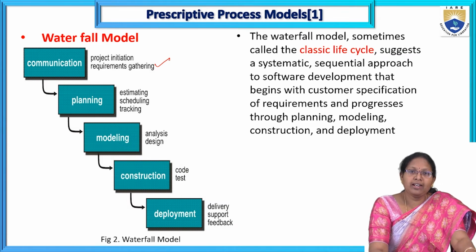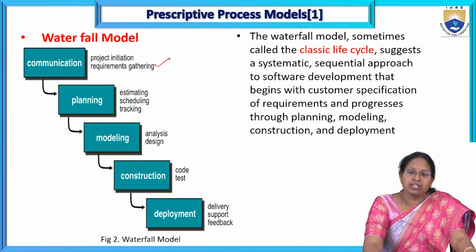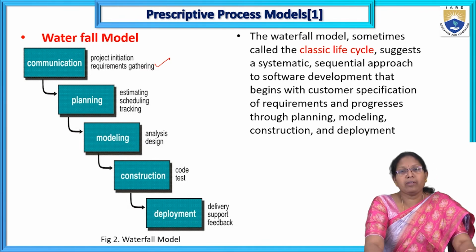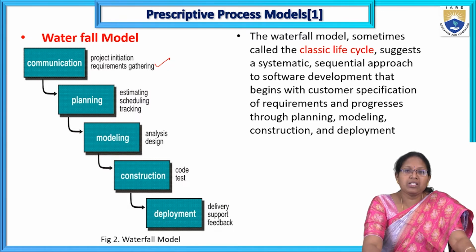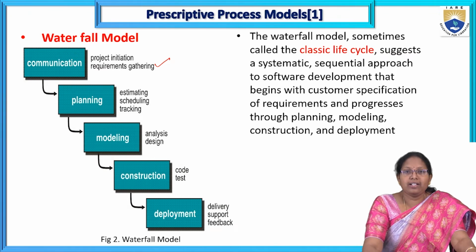For the entire project in the waterfall model, first of all, whatever requirements are gathered, it is not divided into subsystems. It is the complete product, whether a long project or a short project. The complete first phase is over, and only then do we go to the next phase. Once the complete requirements gathering is over, then go for planning. What is planning?